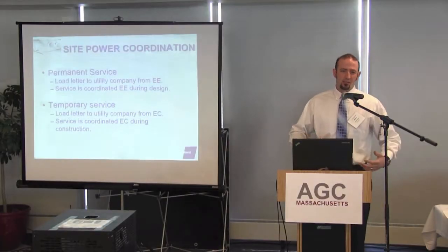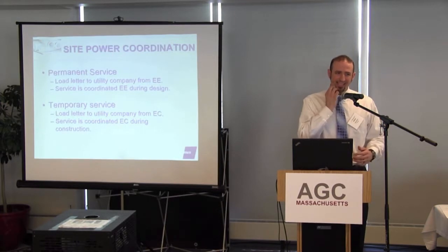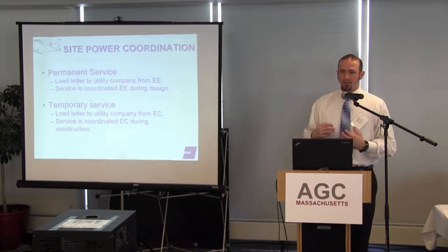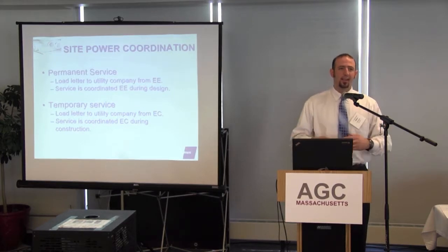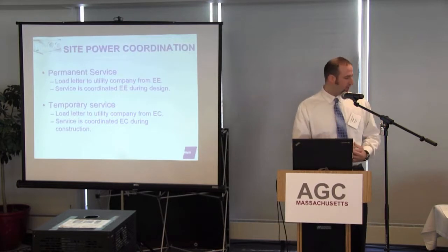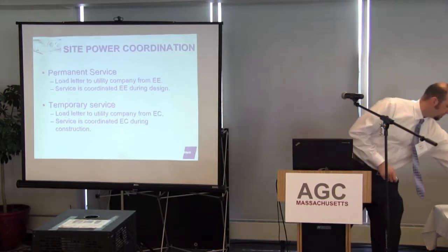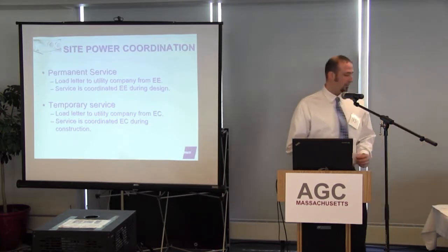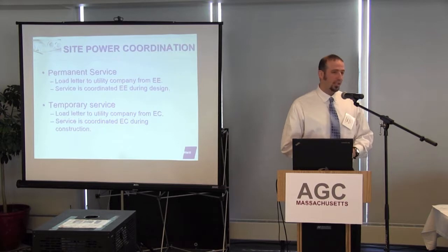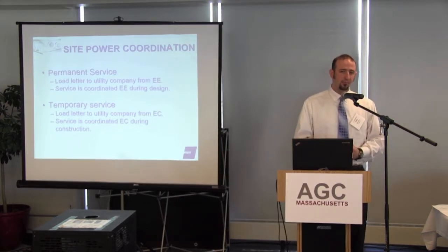So the timing of a service, like he says, is very important. So during the inception of the design is when the engineer has to start understanding what he's going to put in a building. That has to be translated to the utility company. So much like we size our service, the switchboard that you see in E201 has to be sized for the loads of the building.